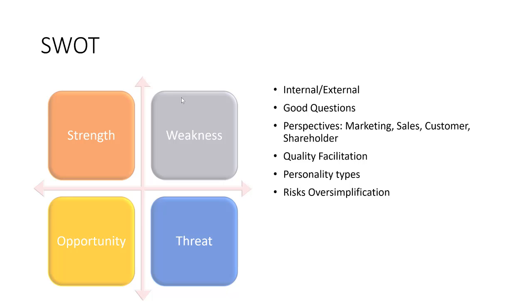Classic way of analyzing any kind of risk or situation to find where you might have risks is a SWOT analysis, if you really are wanting to spend some time. This would be something that you would probably do in the very initial chartering phase, or maybe when you're doing story mapping. Like, okay, this is the product. Now we've mapped the whole thing out. Now let's do a SWOT analysis.